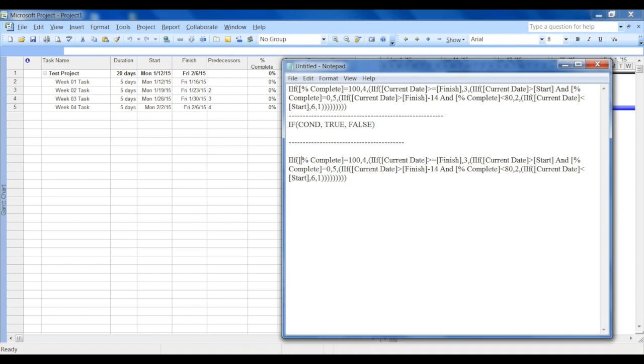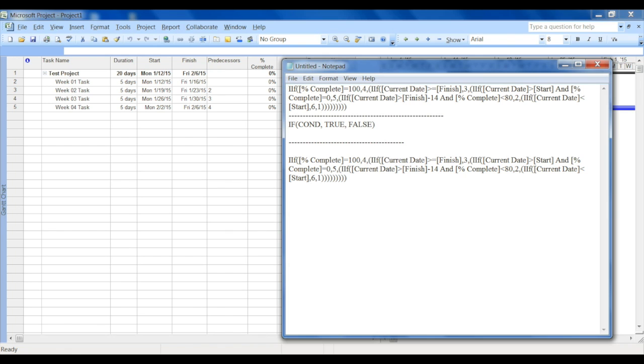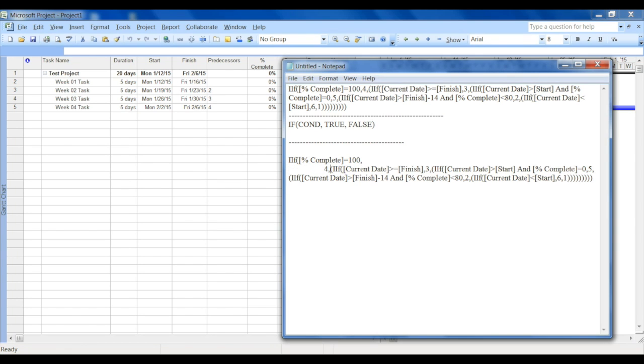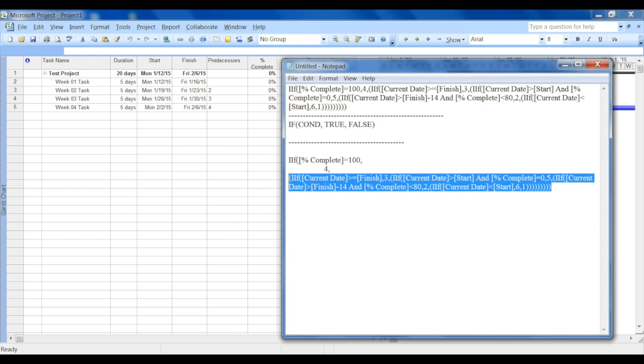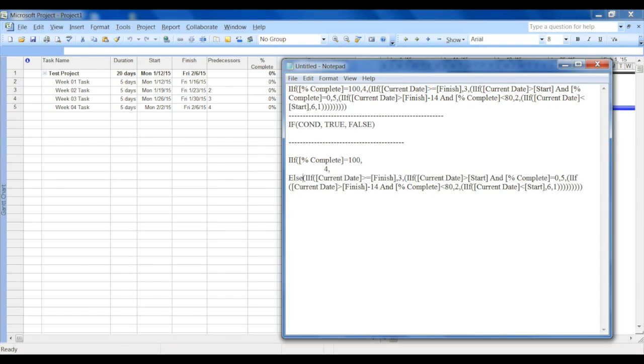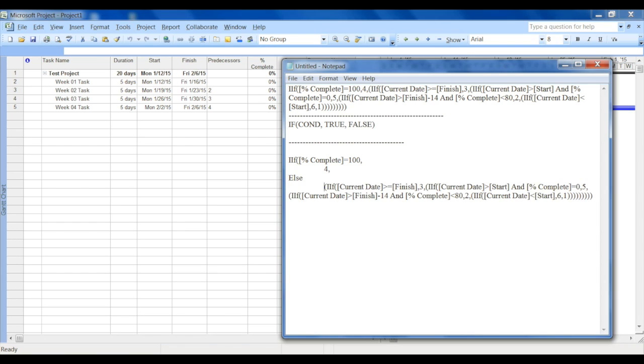If the first condition is: if the percentage complete is 100%, then show it as four. I'll explain in a bit what four is, but that's the condition. And then this is the value when it is true. When it is false, then everything else has to be executed.